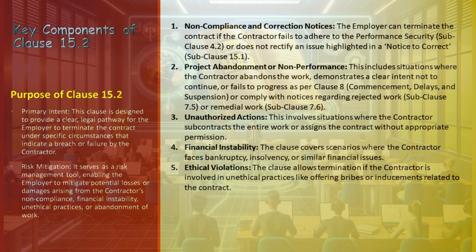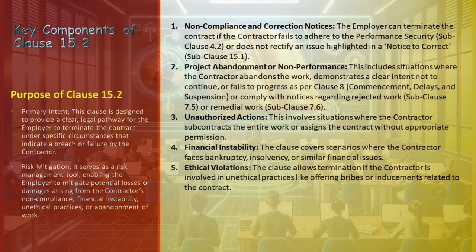Continuing our in-depth analysis of Clause 15.2 in the FIDIC Yellow Book, let's break down the key components. These components represent critical actions or situations that can trigger the employer's right to terminate. Performance Security Non-Adherence: If the contractor fails to comply with performance security requirements as outlined in Sub-Clause 4.2, it provides a ground for termination. The employer also has the right to terminate if the contractor does not address and rectify an issue specified in a notice to correct as per Sub-Clause 15.1.